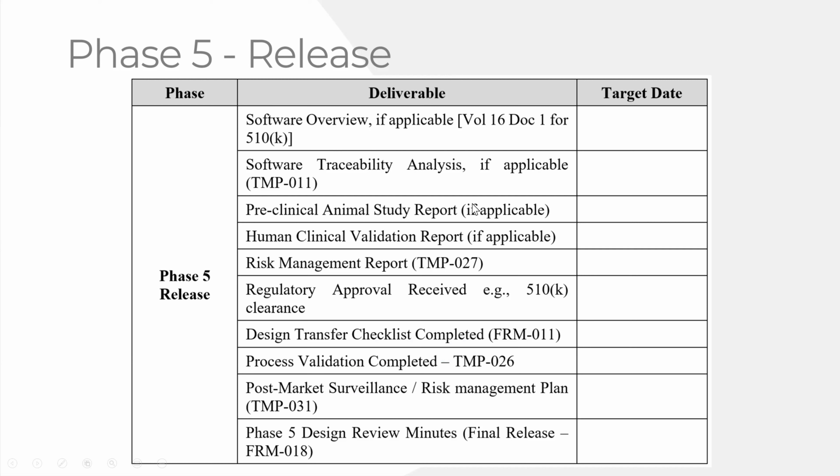If you do animal studies, sometimes we're doing animal studies before a clinical study. And if that's the case, then you might be saying, well, we're going to use this as safety testing, and we're not done yet, and we're not ready to submit a 510K yet, or we're not ready to submit for CE marking yet. Depending on when you need that animal study data, that could be after your 510K, it could be before your 510K. It depends on what the purpose of the animal study is for, but normally it would be prior to a 510K.